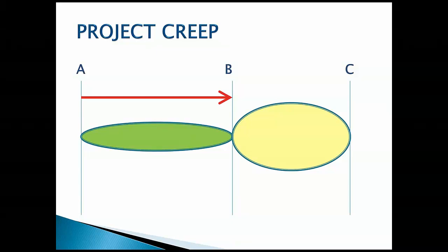So this method, if you think about it, requires these 3 milestones to be able to measure this. In other words, if any time is added in this period right here, if this date's going to stay the same, it has to be subtracted out of this period here. It's that simple, right? So the key is, how do you define that? How do you identify that?